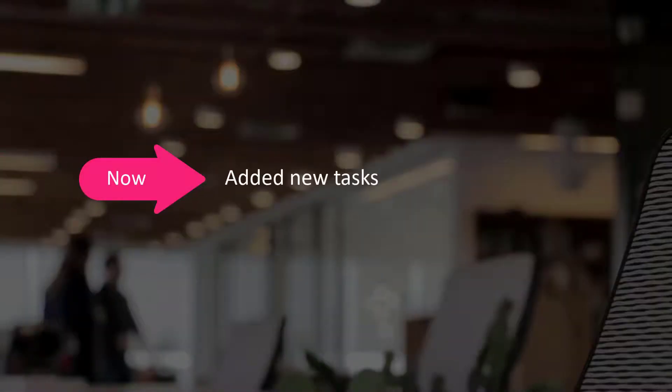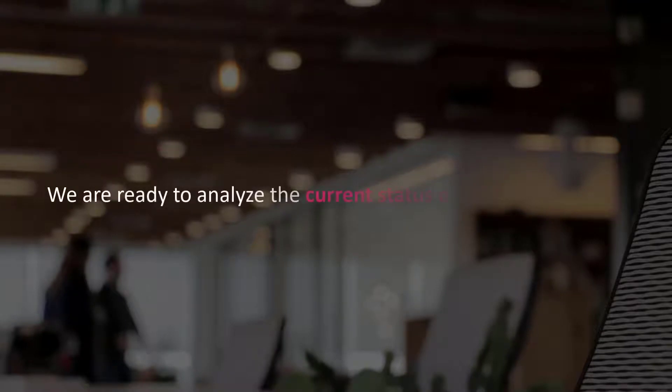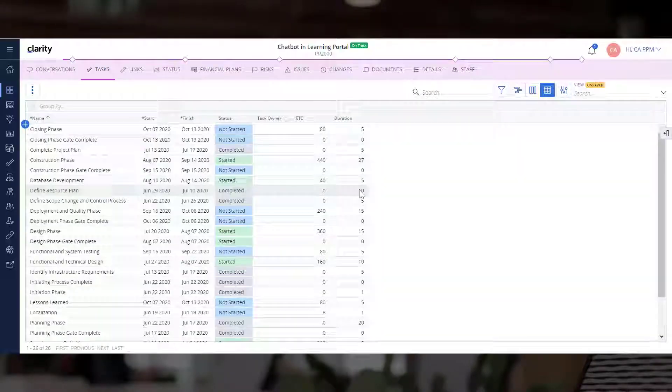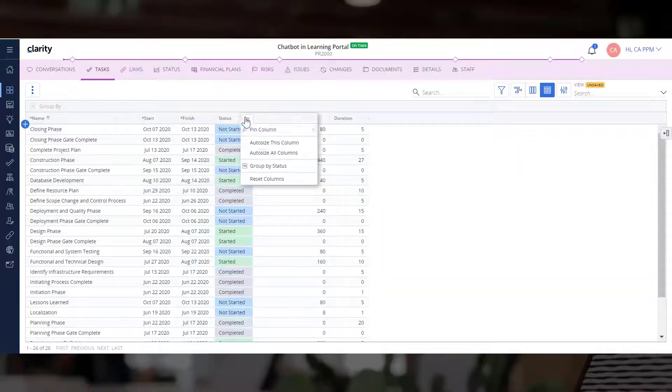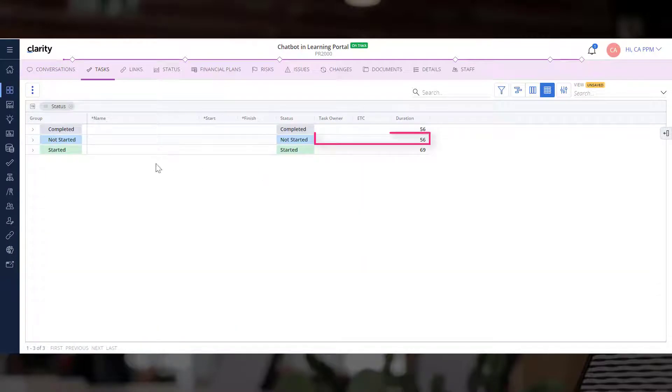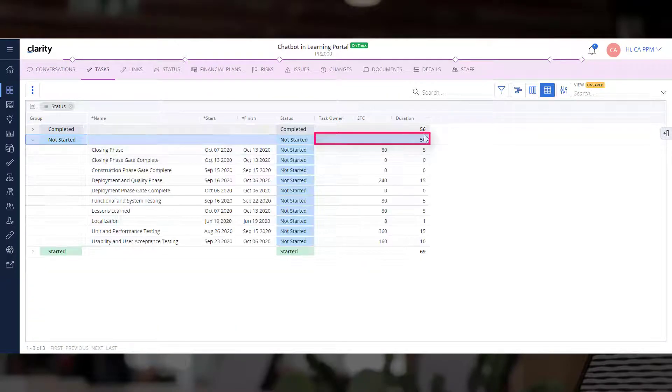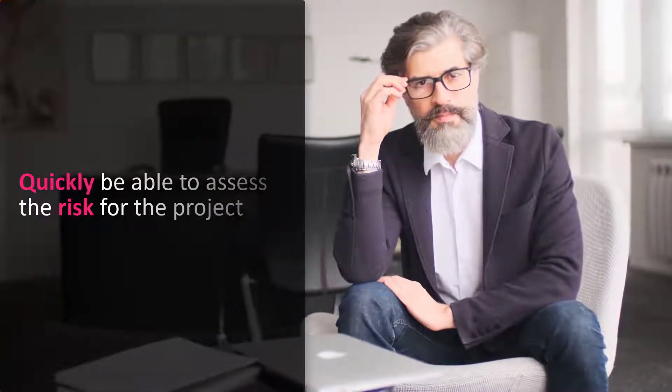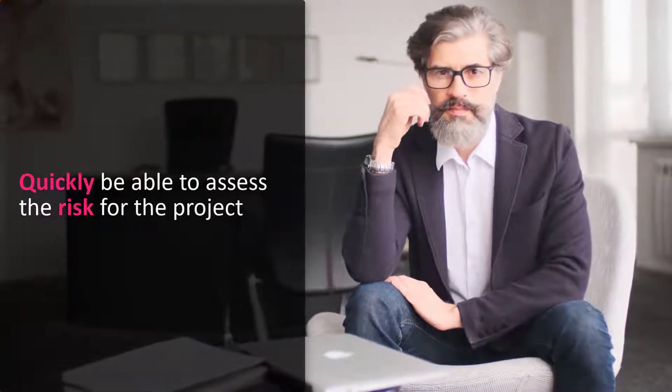Now that we have added new tasks, we are ready to analyze the current status of the project. Let's group the tasks by Status to look at the total duration for tasks that have not yet started. Because the Project Managers know the end date of the project, they will quickly be able to assess the risk for the project.